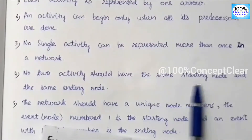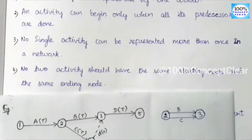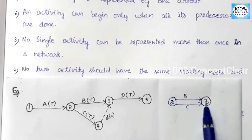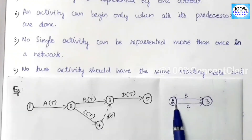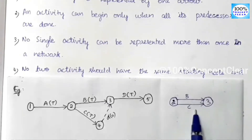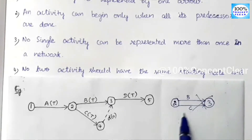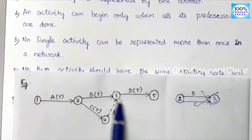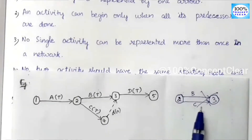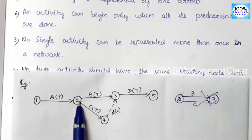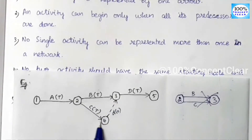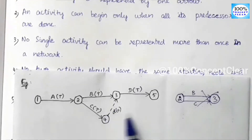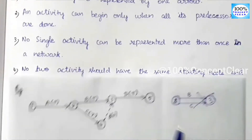The fourth rule: no two activities should have the same starting node and the same ending node. For example, if B activity starts at node 2 and ends at node 3, and C activity also starts at node 2 and ends at node 3, that is wrong. If you want C activity to complete at node 3, you must use a dummy activity.